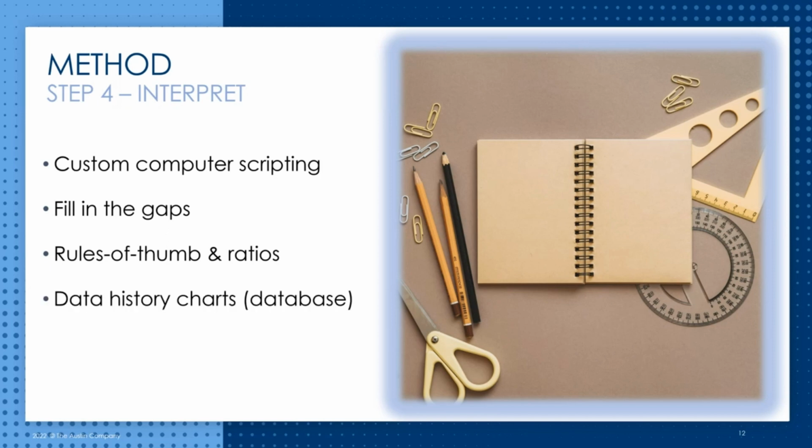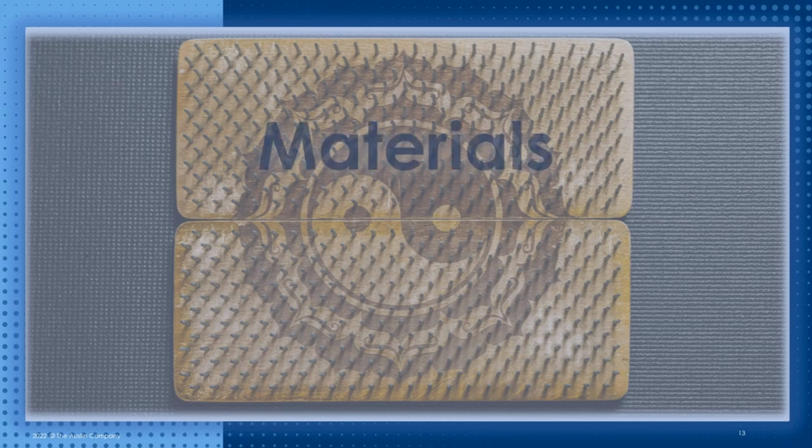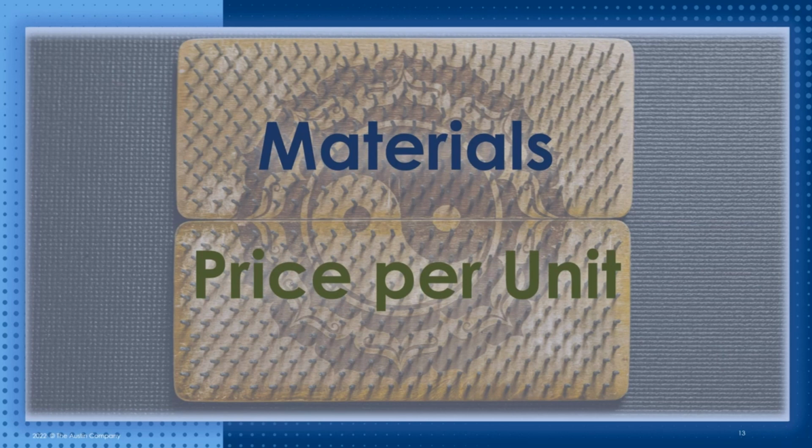We must also log the results of our harvests over time so that we have a history of results we can study. The custom script renders chronological data points graphically in charts. Finally, the script couples the quantities data from our harvest with price assumptions so that we reach our ultimate goal. Indeed, the materials data we have harvested, when viewed together with an assumption of price per unit, will yield a complete estimate which we seek.